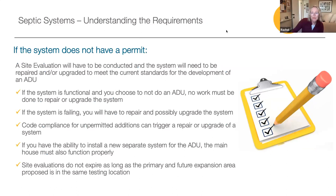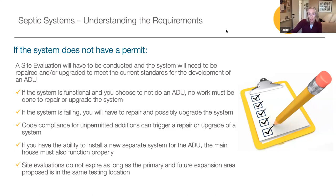If your system does not have a permit, a site evaluation must be done. The system will need to be repaired and/or upgraded to meet the current standards for new development when building an ADU. It is important to note that if your system is functional and you choose not to build an ADU, no work must be done to repair or upgrade the system — so you're not obligated to do the work if you do not move forward with the project.